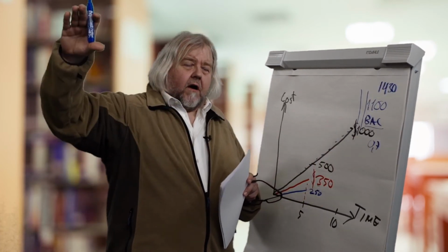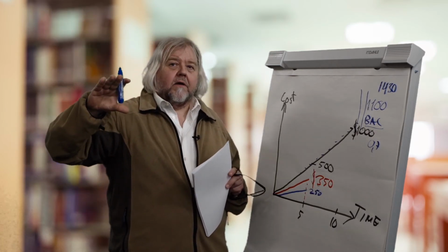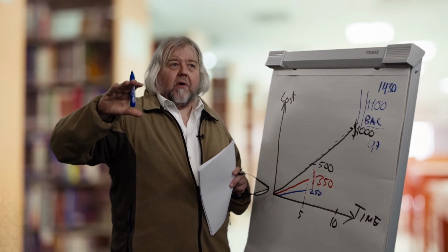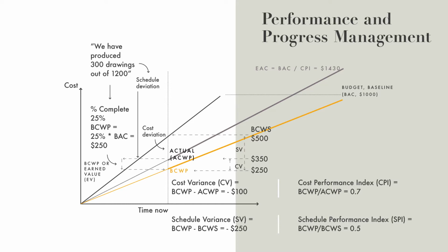which we are going to achieve when we double the project's duration, because the schedule performance index was 0.5. And from this picture, you can also see how the green line, the earned value, is accumulating until 1,000.